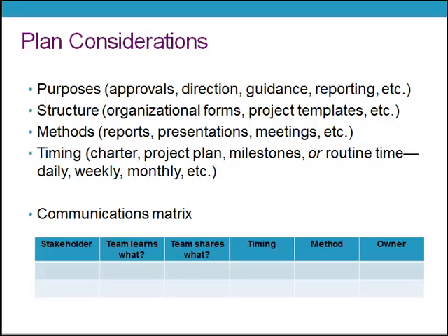Finally, fourth, there is timing. Should this communication occur at regular intervals, such as daily, weekly, monthly, or quarterly? Or are they less regular, as in project charter complete or project management plan complete? Now, to move on to the example communication matrix at the bottom of the screen, it can help with plan development. It focuses on the stakeholder who must communicate with the team.